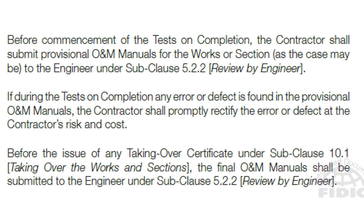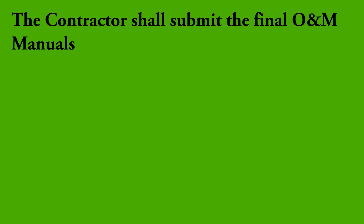There are important points in sub-clause 5.7 to note: if during tests on completion any error or defect is found in the provisional O&M manuals, the contractor shall promptly rectify it at the contractor's risk and cost. Before the issue of any Taking Over Certificate under sub-clause 10.1, the final O&M manuals shall be submitted to the engineer under sub-clause 5.2.2, Review by Engineer. However, it is not stated that a notice of no objection is essential for the final O&M manuals in order to issue the TOC.